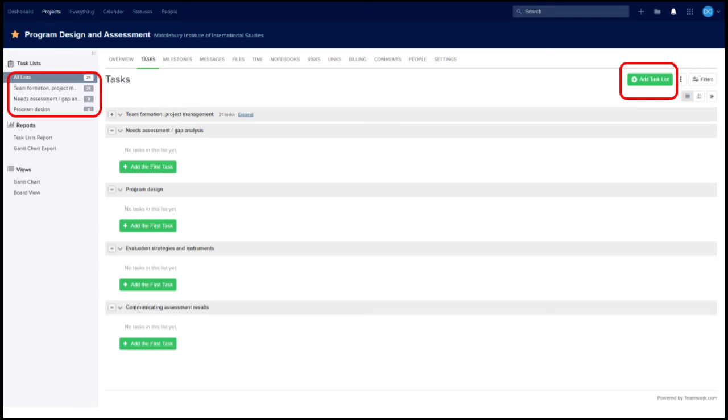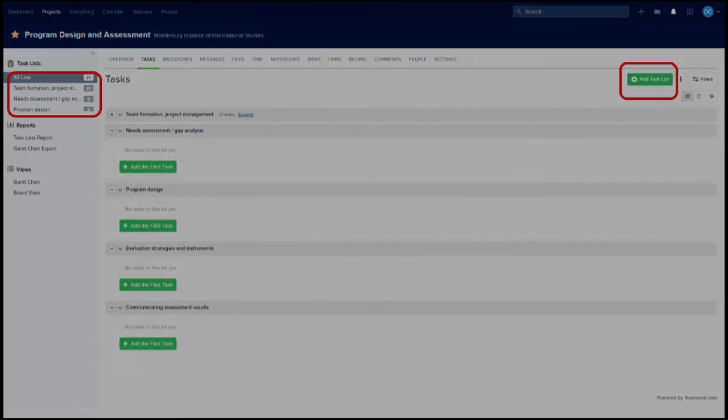So the organizational framework here is quite straightforward. Logically, it's not complicated to say, I have a big thing to do. Let me break it down into smaller sets of things, and then let me break those smaller sets into individual tasks that can get done. But this is a great and easy way to organize yourself, to keep track of all those things.